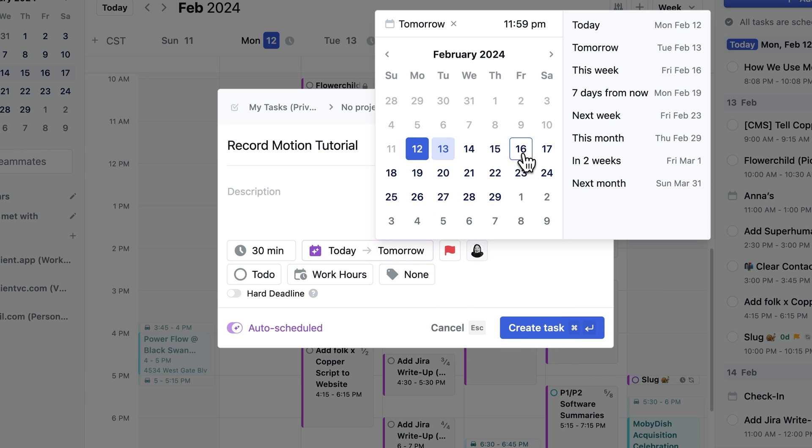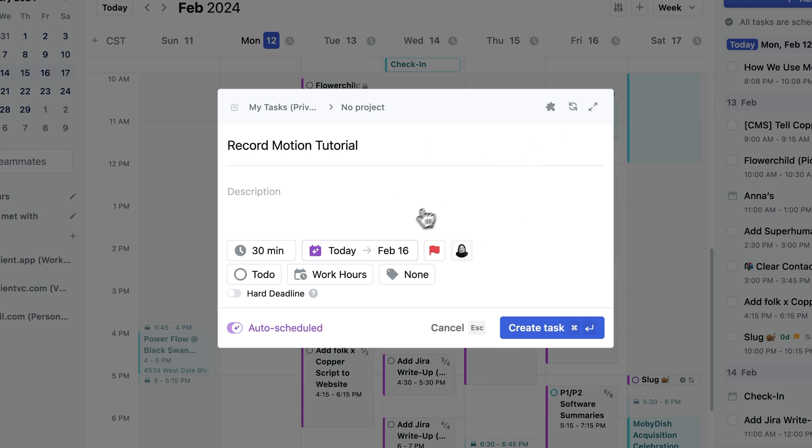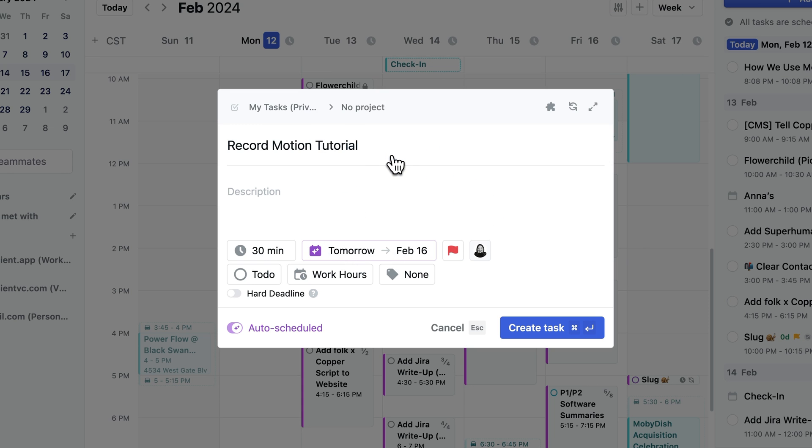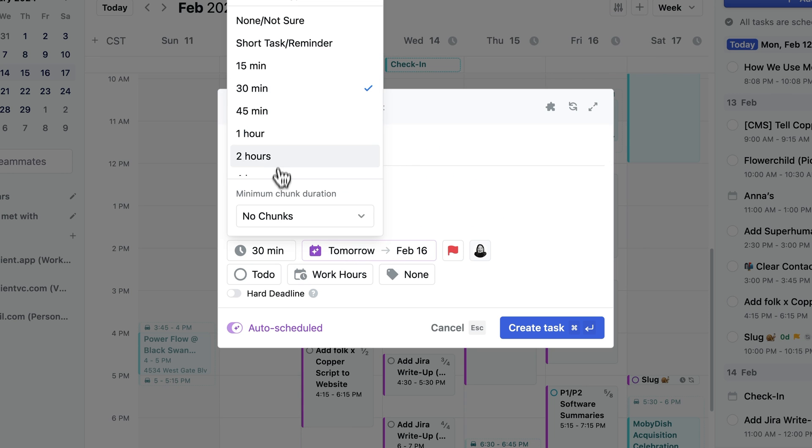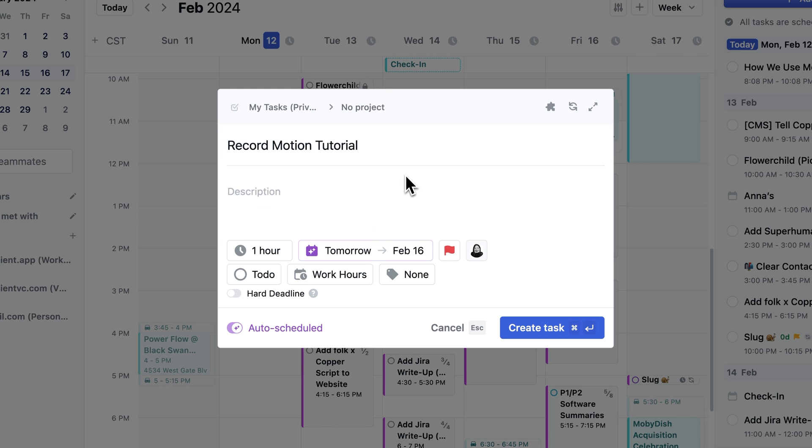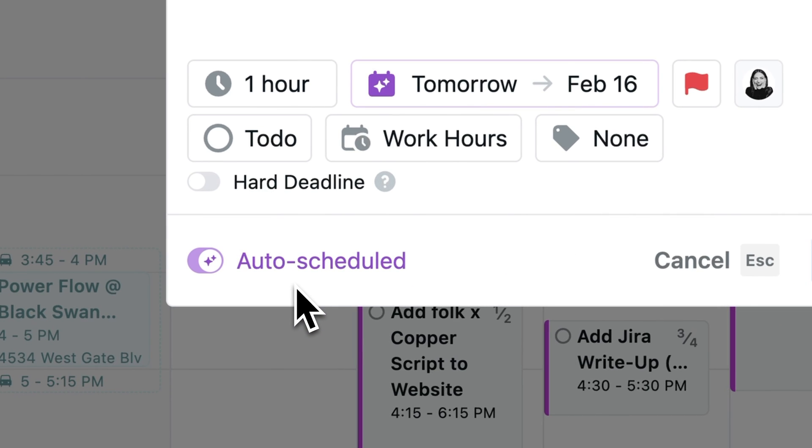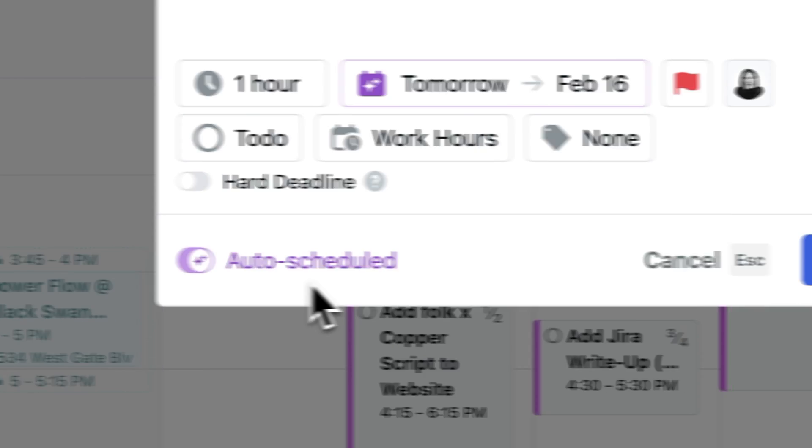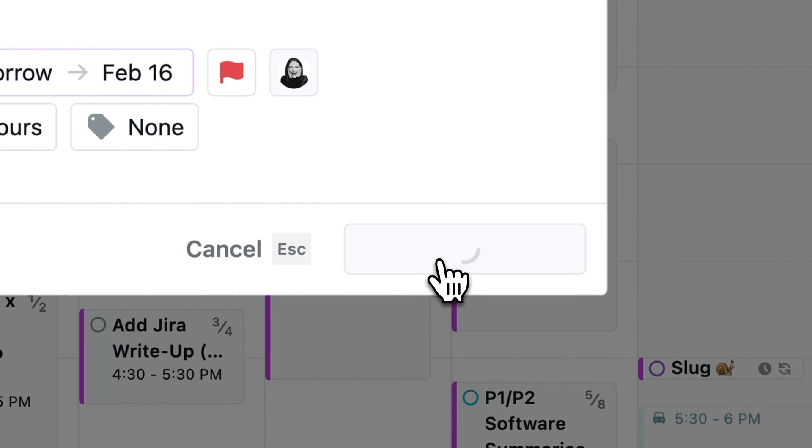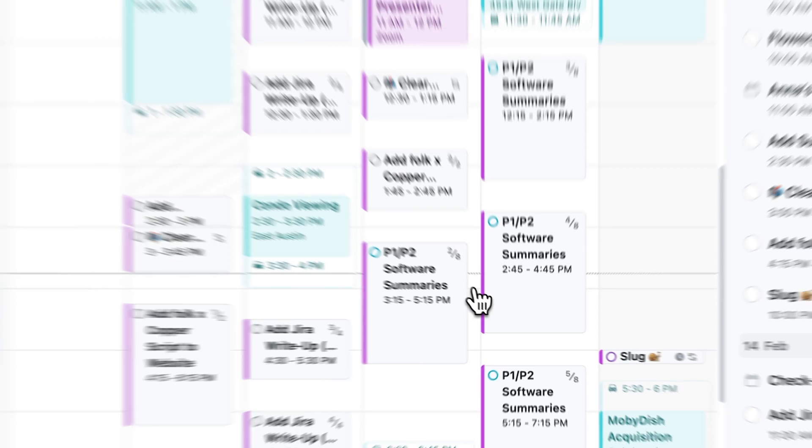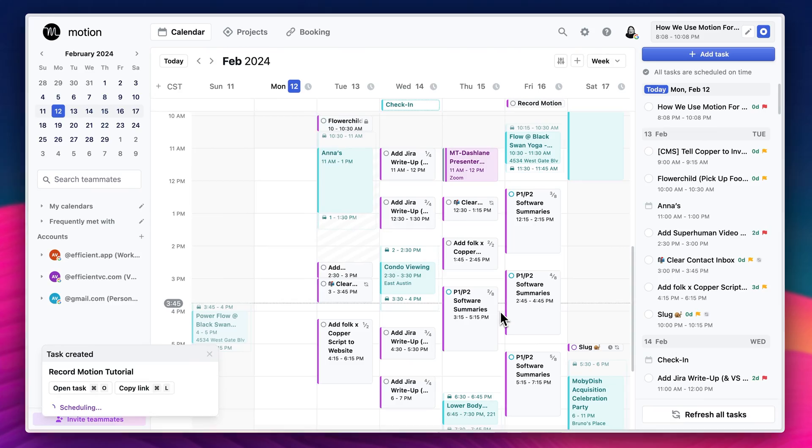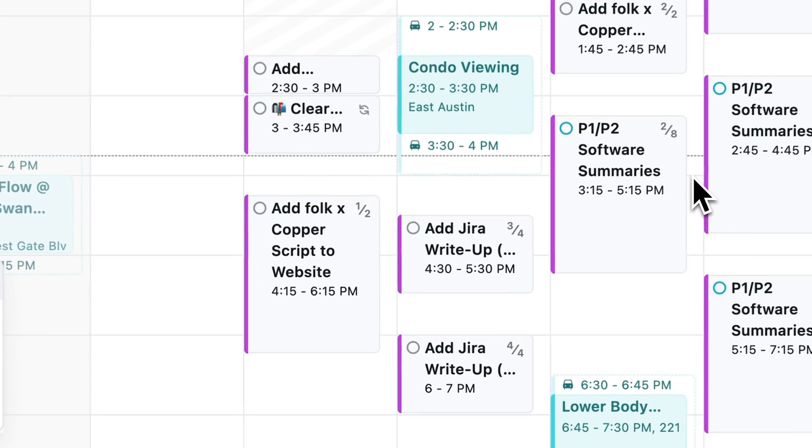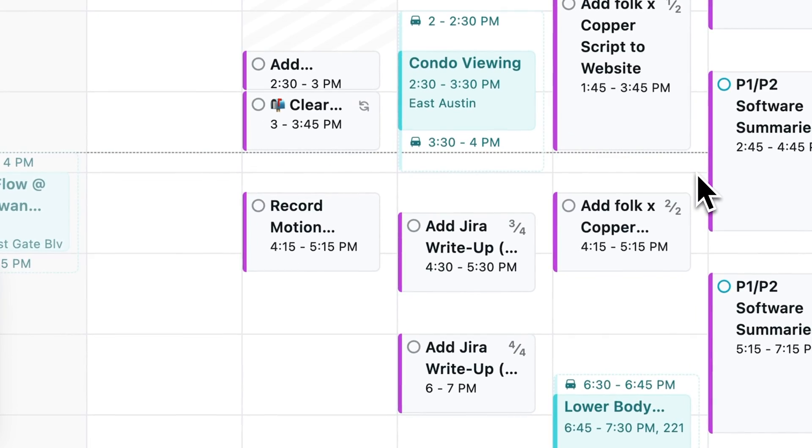Then you want to set your priority for the task, the end date, the deadline, and also a start date if you don't want to start it for a while. And then duration, which is how long the task is going to take you. Now see this little auto schedule toggle. Leave it on because that's your AI scheduler that's going to auto schedule the task right on your calendar.